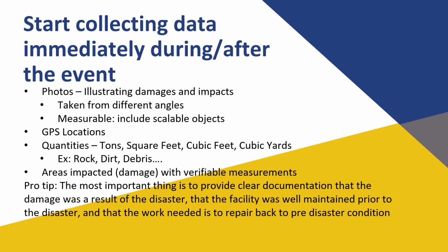To ensure a smooth process, document everything and start right away, during the event if possible, depending on the event of course, and afterward to show the damage or work performed. Provide photos illustrating damages and impacts taken from different angles. To make it easy to show measurements, include scalable objects in the photo. Record GPS locations of damages or of where photos were taken from, and provide quantities with standard units where possible. That is, tons, square feet, cubic yards, etc.